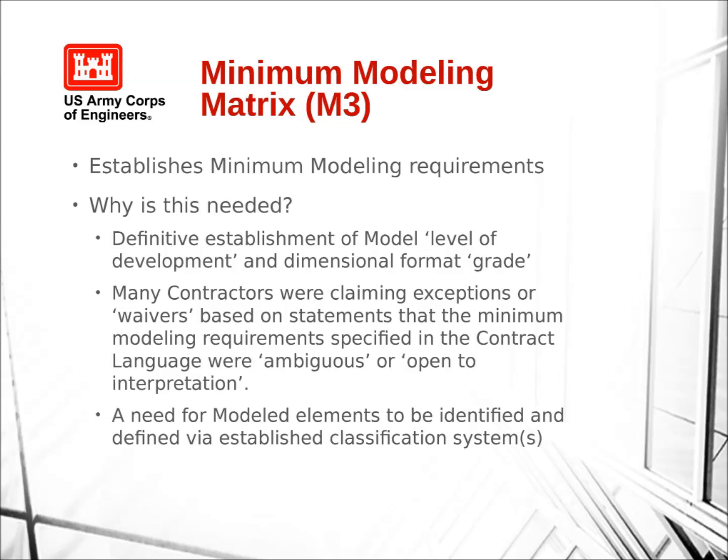So it essentially creates a spreadsheet, so you have this nice matrix of what your expectations are. It gives a way for the contractor and the design team to very clearly say, all right, for these types of doors, here's what we agreed would be provided for this fixture, for this HVAC unit, et cetera, et cetera. So this helps take a lot of that ambiguity and contract interpretation off the table.